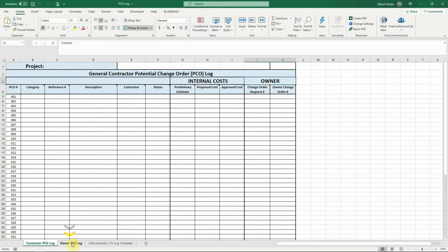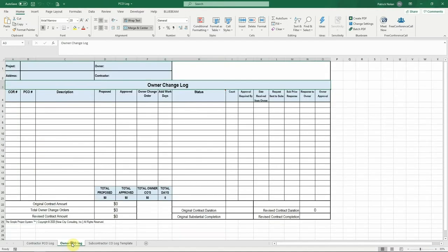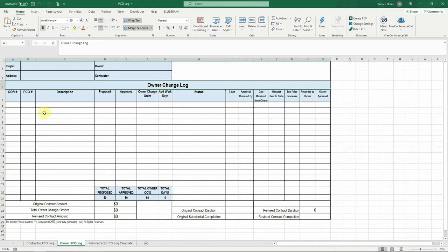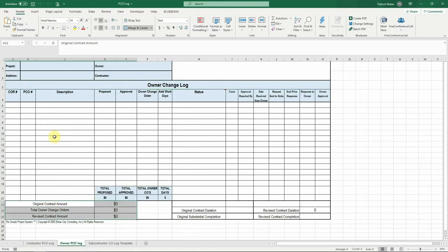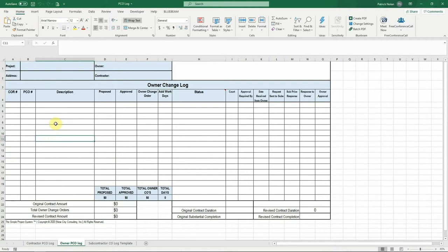The second tab is the owner PCO log. This log is used to track all owner related PCOs. This log contains an overview of your owner contract and helps you track each owner PCO in summary format so that you can track the overall status of owner PCOs on the project and also provide this summary to your client for review. This log is the client facing log that gives overall picture of PCOs that are being presented to your client for approval.